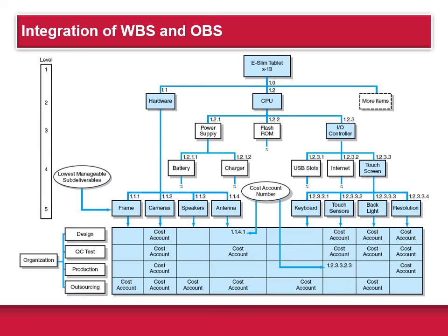As with the work breakdown structure, the organization breakdown structure assigns the lowest organization unit the responsibility for work packages. Herein lies a major strength of using the work breakdown structure and the organizational breakdown structure together, because they can actually be integrated together, as shown in the following example. The intersection of the work packages and the organization unit creates a project control point that integrates work and responsibility very nicely.